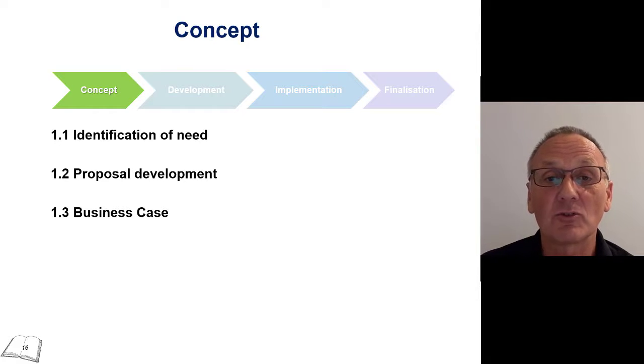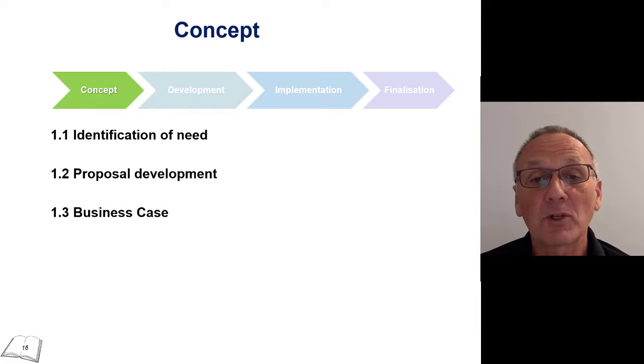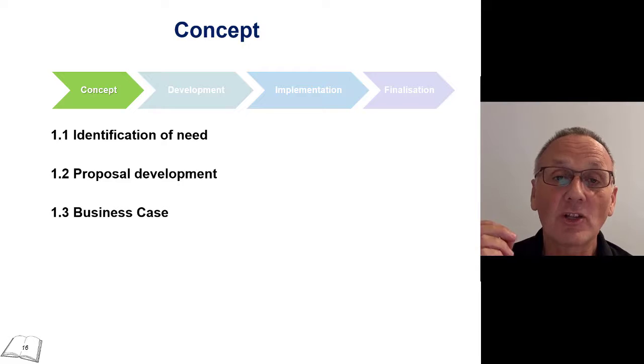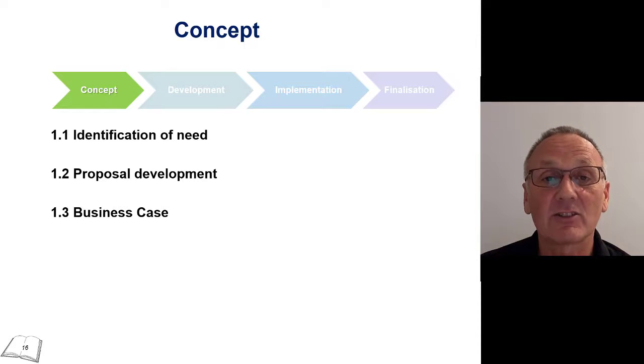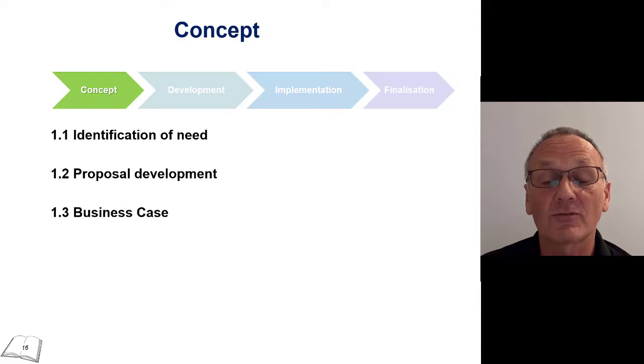Once you've chosen that solution, that then is fed into the third part of this particular phase, developing up the business case. So you put a little bit more work in and you put some detail around how you're going to deliver that chosen solution and what it is going to cost, roughly how long it is going to take. Now, they're only indicative costs and times at this stage because this is very early days and we may not have the technical resources involved. So high level estimates of time and cost essentially are put into the business case.